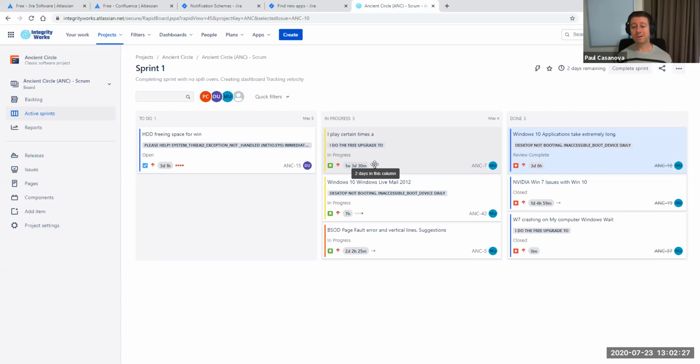It could be people go, we had these external dependencies that were blocking us, and that would feed into your definition of ready. Or it could be, look, I just didn't know what I needed to do with the card, and I got stuck because it was unclear to me. That would suggest further backlog refinement by the product owner. So it's visually a very simple thing, but I think it could be really powerful and helpful.